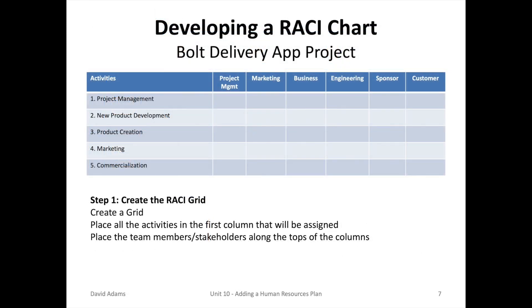When creating a RACI chart, we don't have a standardized template. Rather, it's very easy to create by just making a simple grid. You place the activities in the first column and all the key players along the top, which includes your project team, your sponsor, your customer, and may expand to other stakeholders.